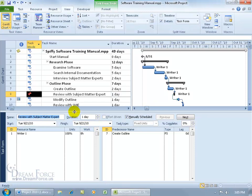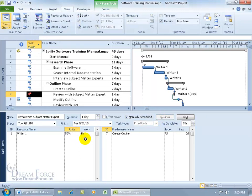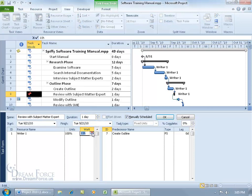If I undo that and try the units field instead — going down to 50%, meaning he can only work 4 hours a day — and click OK, the work becomes 4 hours for one day. Let's hit undo. And then if I change the work field and set it to 48 hours and click OK, what do you think is going to happen?